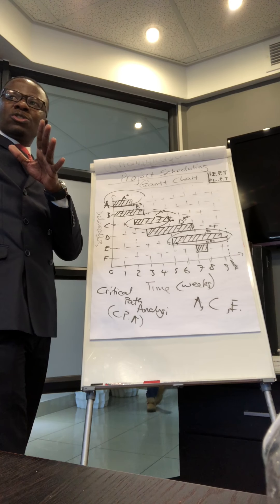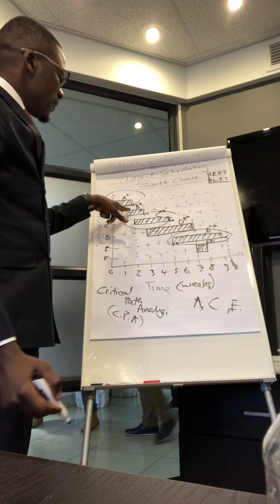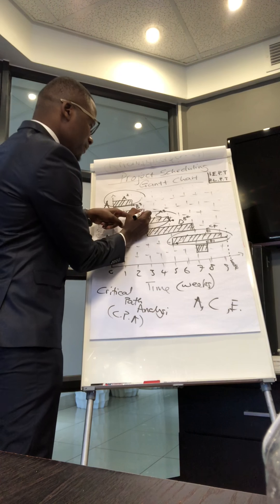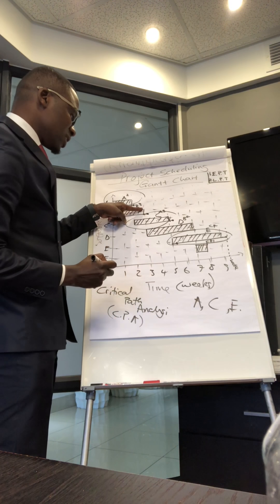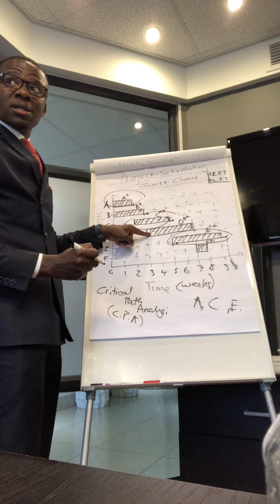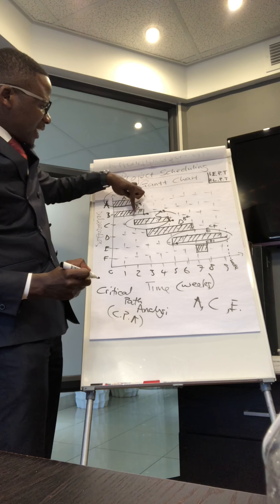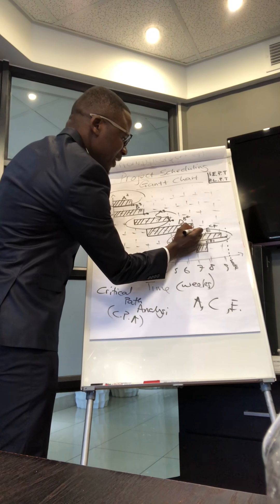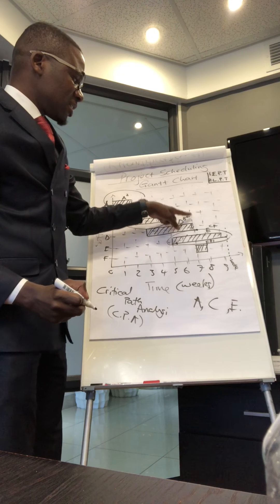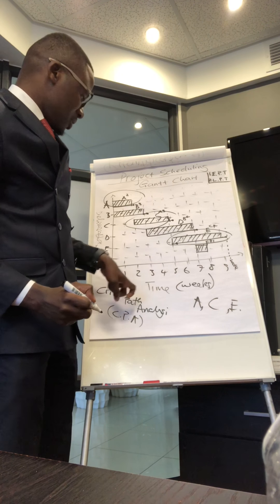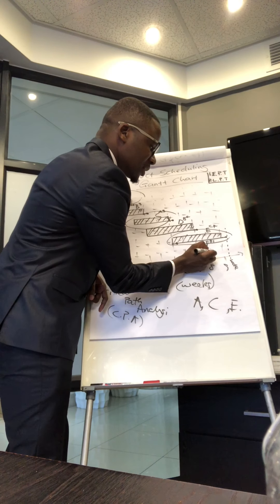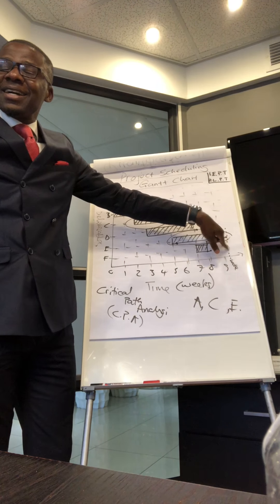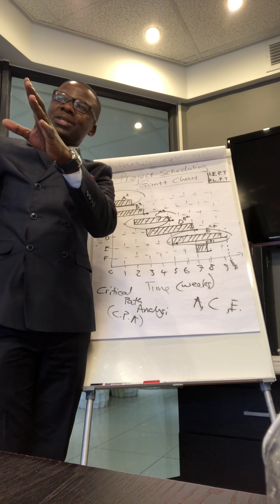How come B is not critical? Let's do a study: if you move B by a single day, it will move D by a day, which will move F by one day — but F still finishes inside week nine. So delaying B does not push the project beyond its deadline, which means B, D, and F are not critical.